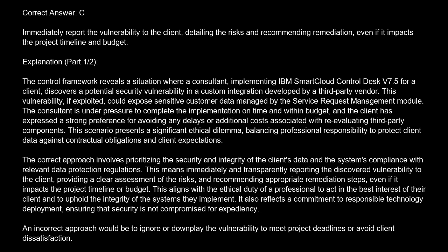This vulnerability, if exploited, could expose sensitive customer data managed by the Service Request Management module. The consultant is under pressure to complete the implementation on time and within budget, and the client has expressed a strong preference for avoiding any delays or additional costs associated with re-evaluating third-party components. This scenario presents a significant ethical dilemma, balancing professional responsibility to protect client data against contractual obligations and client expectations.